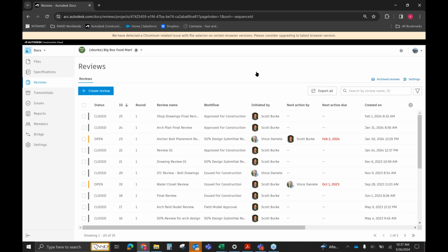So you can see we have quite a few reviews that have gone through on this particular project. We have the status listed over there on the left as to whether or not those reviews have actually been finished out. We have what round of reviews those have gone through, as well as the name and the workflow that we used. So I'll go through and show you how we designate these workflows, but we're able to create them so that for different types of files, you can have different workflows that go into place. So if you're sending shop drawings through for review, we can go ahead and create a shop drawing review workflow. That's going to help dedicate who is actually going to be responsible for doing that review.